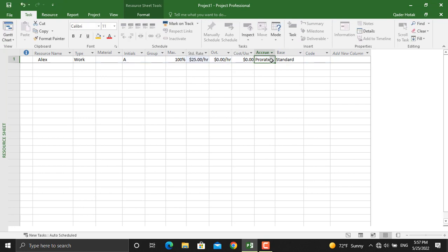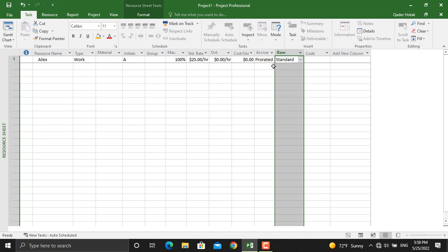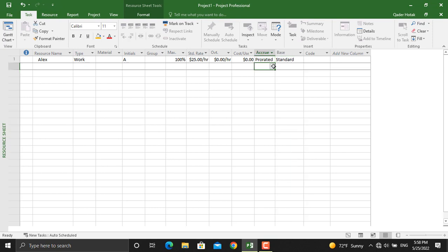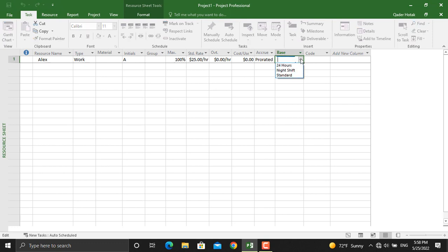Next is the Accrual of the resource. There are three different types: are you going to pay the resource at the start of the activity, at the end, or is it going to be prorated? Prorated means the cost for the resource will be divided equally over the duration of the activity. We will select Prorated. For the Base Calendar, you will select Standard — the other options are 24-hour shift and night shift.